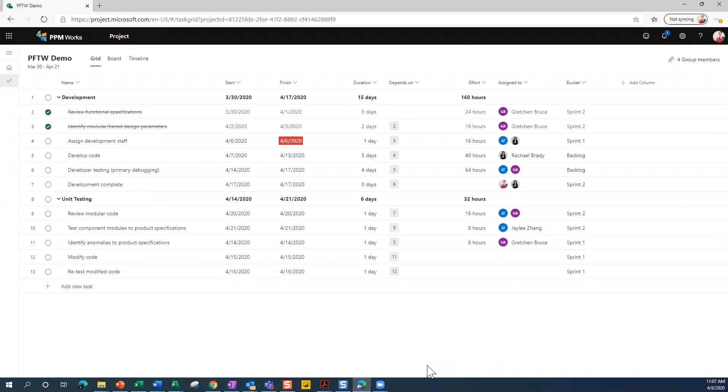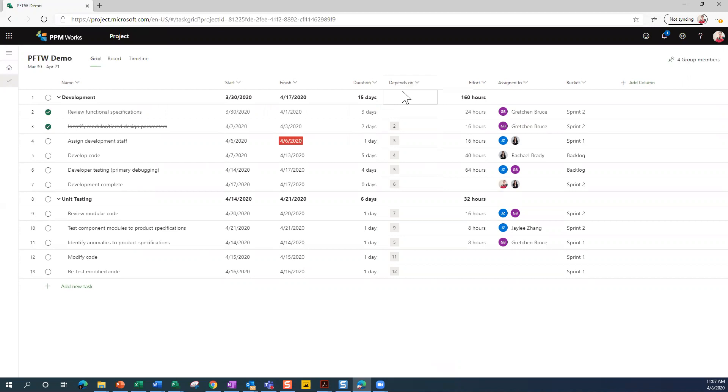And you can see a task list here. You've got dates, you've got durations. You can see this column called Depends On. That's your predecessor column if you're accustomed to working in Microsoft Project.